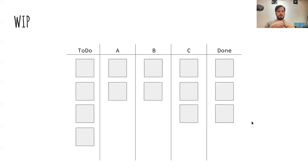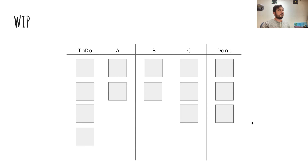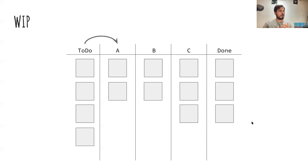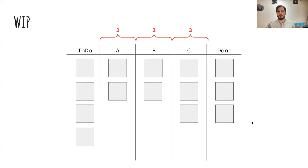I'm going to start with WIP — that might sound counterintuitive because WIP is the flow metric we don't use for forecasting. But WIP is the one thing we can control explicitly. In order for something to become work in progress, we have to decide to start it. If we can control WIP and manage it effectively, we take the first step towards predictability. The obvious way is to create WIP limits — and hopefully stick to them, because if you don't, they're not very useful.